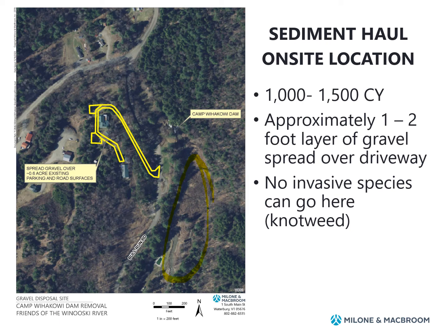We'd also like to make sure that at the end of each day the landowners would be able to access their homes and buildings, so that at the end of the day the contractor would need to roll over and feather out any existing work they're doing up there so the landowners can make that access.